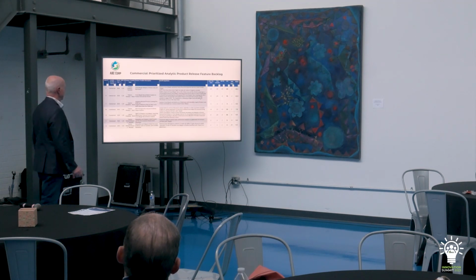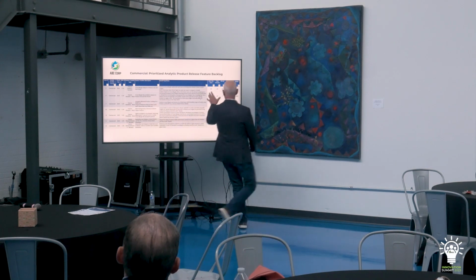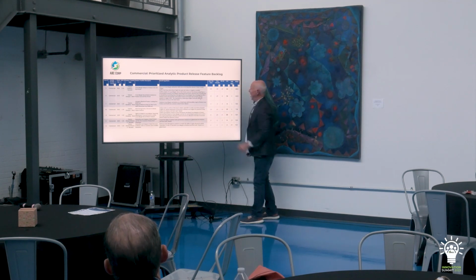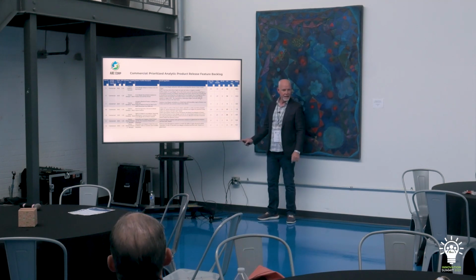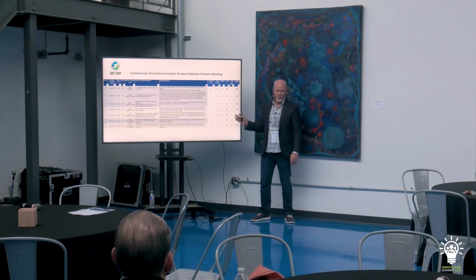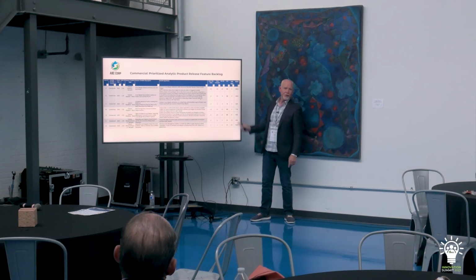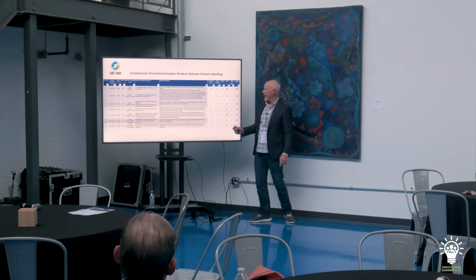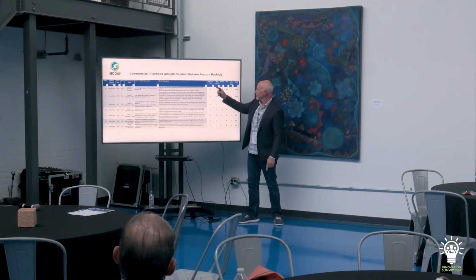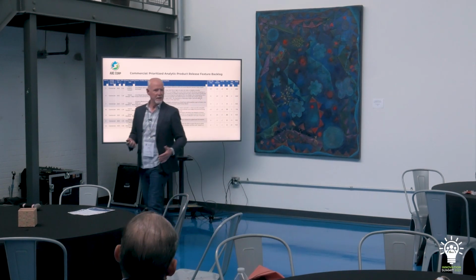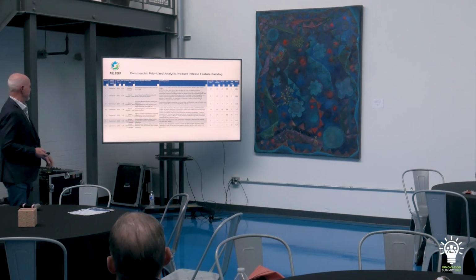So for this company, we did that exercise first with the business community. I had them do it, and then I invited IT back in, and I hid that, and I said, okay, IT, tell me which ones are easiest versus most difficult. And from a facilitation standpoint, the reason I do that is I don't want bias influencing IT's ranking, and I don't want bias influencing the business's ranking, because if they say, well, that one's really hard, I want this independent input of the rankings before I calculate the score.